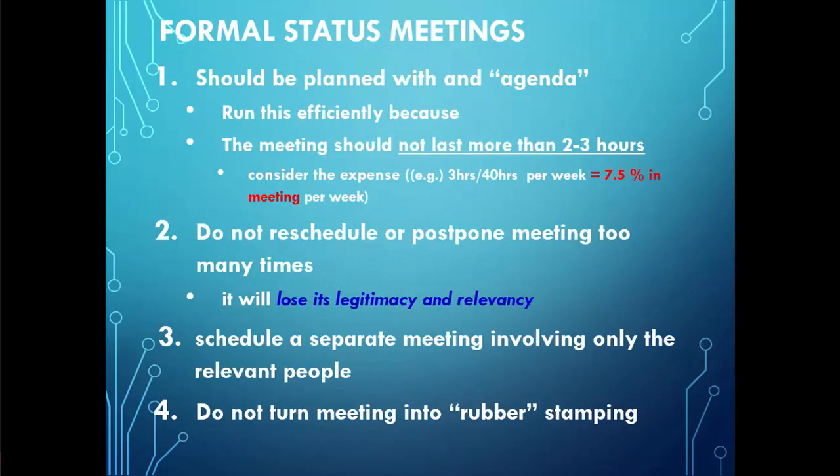Formal meetings should be planned with an agenda to inform attendees of the type of information that will be discussed and collected through the meeting. In addition, it will assist in running the meeting efficiently. Data collection meetings should not be long, at the most maybe 2 to 3 hours. Actually, short meetings will be more efficient, less expensive, and take a smaller percentage of attendees' work schedule.